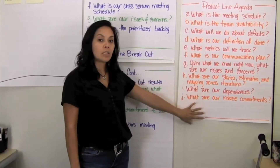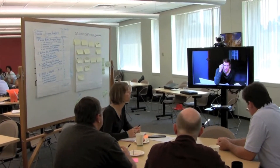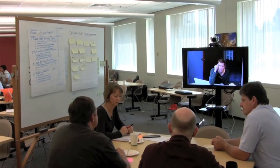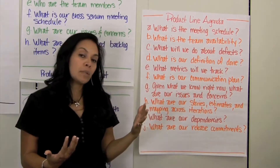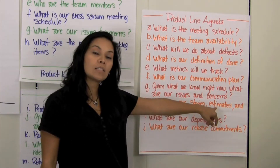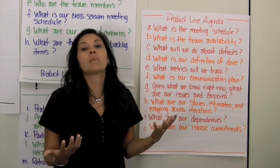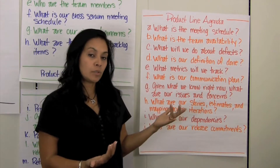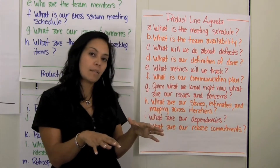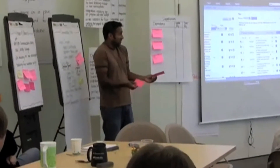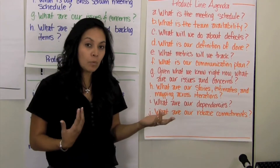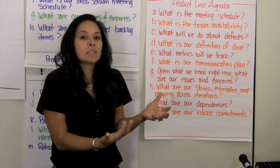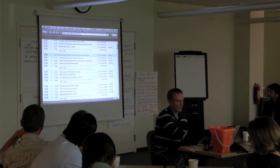At the product line breakout, each team has its own agenda. They discuss their meeting schedule, team availability, how they're going to handle defects, their definition of done, the metrics they're going to track, and the communication plan. Through the backlog grooming session, the team should have already reviewed stories and provided high-level estimates, so they're familiar with their backlog. During release planning, they take stories from the product backlog and move them into the release backlog, then map each story across iterations. We project Rally on the wall and the team collectively maps stories across each iteration.